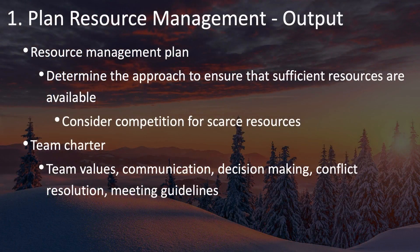The main outputs of your plan resource management process are the resource management plan and the team charter. The resource management plan determines the approach to ensure that sufficient resources are available. You'll need to especially consider competition for scarce resources, and it will be especially important to work with your PMO, your project sponsor, your program, your portfolio, and even other project managers and functional managers to acquire the scarce resources you need. You should not assume that the resources you need will be available when you need them — even once reserved, check periodically to make sure they'll still be available for as long as you need them.